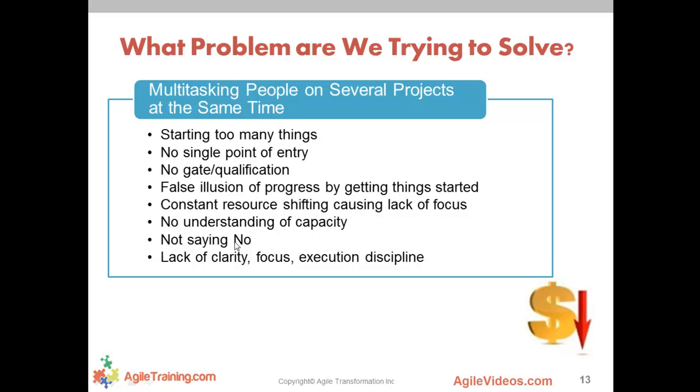Not knowing how to say no, and even what I prefer is not even the word no, it's "Sure, let's rank that on the backlog." Oh, you've got this wonderful new idea? That's awesome. That sounds awesome. Let's take that to the team that manages the enterprise backlog, and let's see where they're going to rank that. And if they rank that way low, then it's way low. It's not even necessarily saying no. It's just, let's see how that ranks against our other priorities.